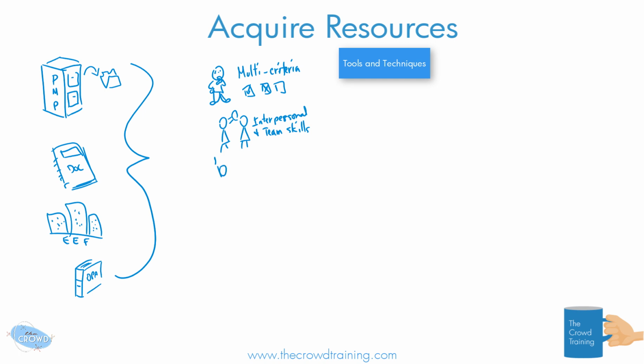Sometimes you don't have a choice. Sometimes somebody is already given to you, and that's it. This person is going to be with you whether you want it or not, or you are required to use certain materials. Maybe you can only use certain trucks, or the land that you're using is already pre-assigned, or the materials that are going to be there. So again, it is pre-assignment, which means that it is given to you and acquired for you even before the project begins, whether you want it or not. Hopefully you like it more than you don't.